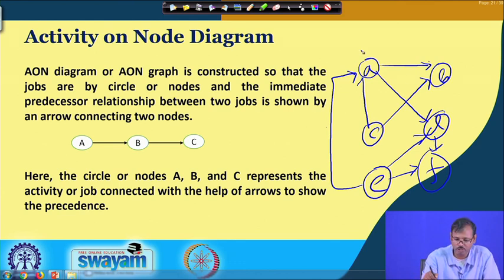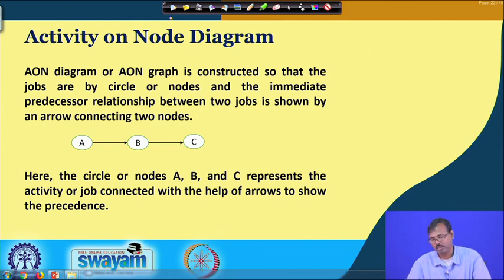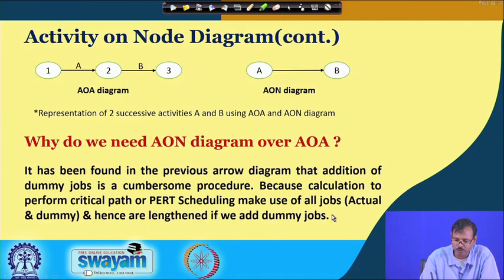But this is actually a wrong diagram, where you will find some problem related to the cyclic mode of the network. But giving the precedence and succedence of a job is very easy while you are presenting the job on the network. Only by giving the arrow connecting to that node or ending at that node shows the precedence of that job, and the arrows coming out from that node show the succedence. So, basically the construction of the network is very easy in this activity on node diagram.